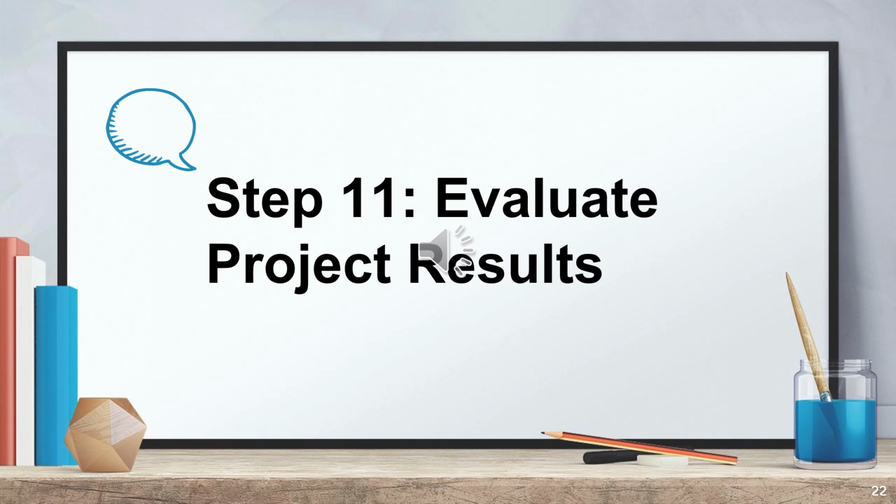The next step is to evaluate the project result. The project has been completed, and it is important to do a post-mortem report, even if it is only for internal purposes. You can pinpoint what went right and what went wrong, determine what could or should have been done differently, and establish the best practices for use in future undertakings.